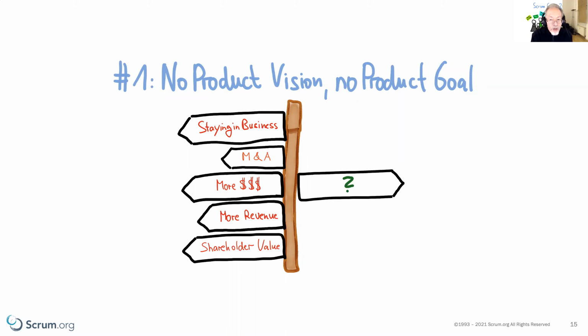So one product owner works if that product owner is delegating much or the majority of the product backlog management to the developers, which is really helpful. I would even extend that to much of the product discovery work. I can tell you, you can train your developers to run user interviews. It absolutely works, and it's magic, because the problem of critical information getting lost in translation is gone. So my suggestion: the more teams you have, the earlier you need to make sure that the developers accept work on the product side.